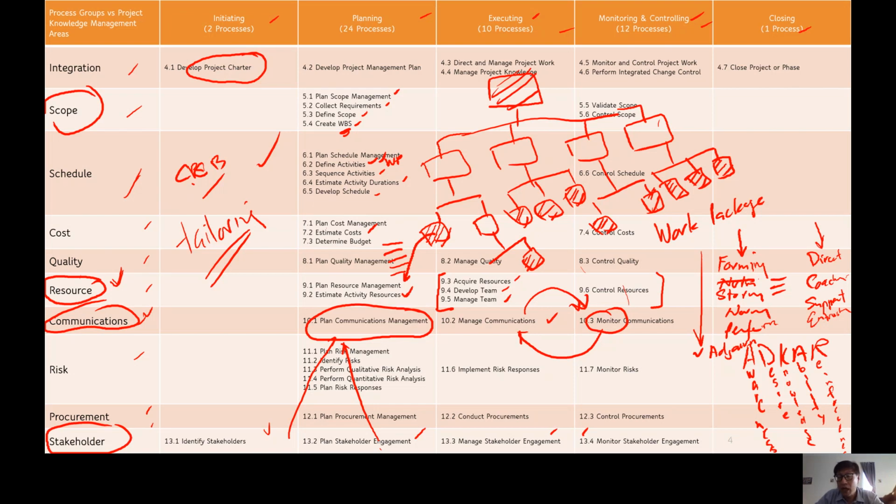We can do budgeting. If we are buying things like equipment, materials, or whatever that may be, we know how many units and when we need to buy them, and what season, on-peak season, that kind of thing. And we know the pricing per unit, we can determine how much it will cost, estimated cost, before we commit ourselves. So we can build the costing numbers. Now, what is budget? Budget is actually the costing numbers that we have created, the estimated cost we have created for every work package, for every activity. Sum it up and put in what we call a cost reserve, a buffer.